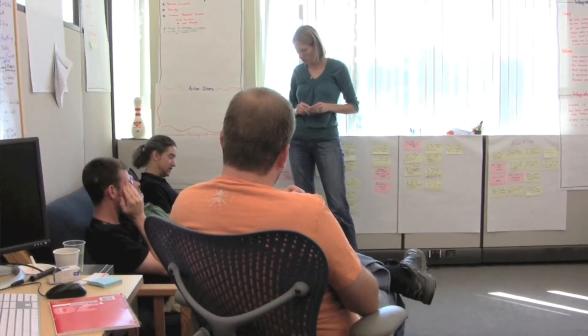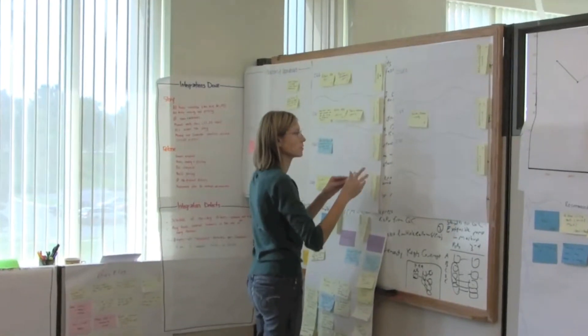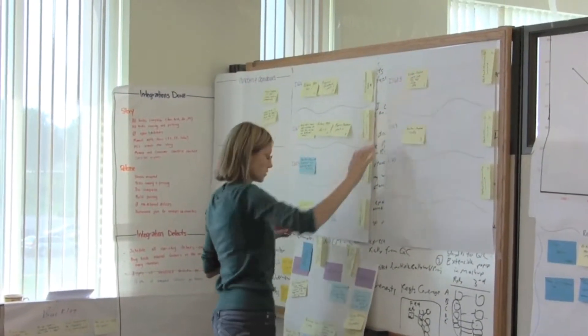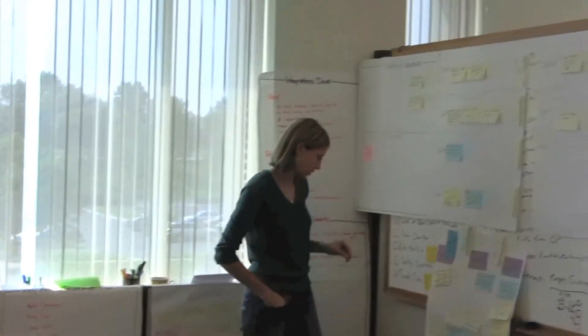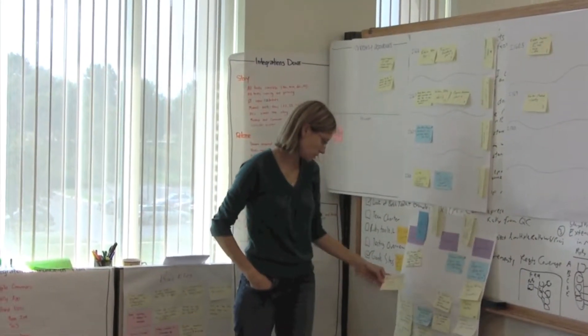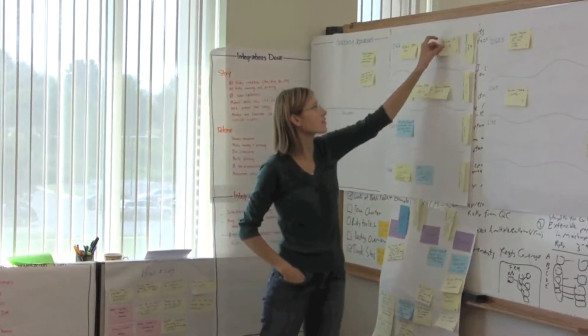The purpose of the backlog grooming session is for the entire team to talk about the backlog and look at the details of each of the stories, making sure the entire team is clear on what is going to happen for the upcoming release. This is a great opportunity to discuss each story's details, risks, and dependencies, and then provide the product owner with a high-level estimate. At the end, the product owner should have a clear list of stories and can move forward with prioritizing the backlog.